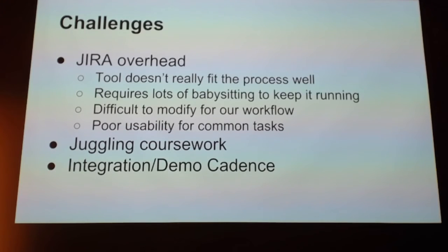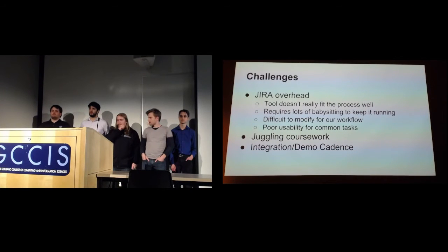And also our integration and demo cadence. We were trying to do weekly releases and a demo every week, and we just never got up to that speed. We'd spend too much time trying to integrate. We didn't have as good integration planning as we probably could have.